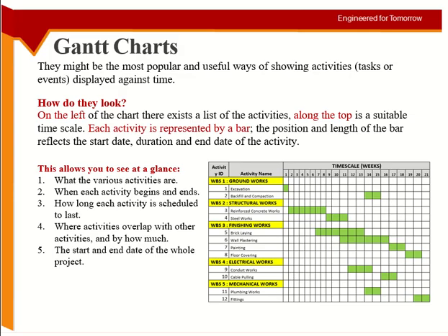So on the Gantt chart, you can see the start of the activity and the end of the activity. You can see the duration of the activity. You can see the overlapping between the activities as well. Now, overlapping is something else and dependency is something else. Two activities may be overlapping just by chance, but dependency means that they have to be one after another. And you can see the start and end of the whole project.